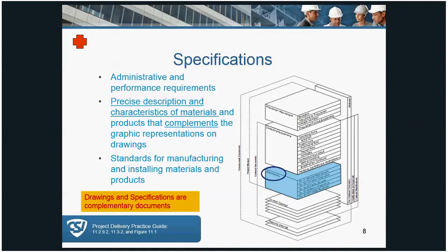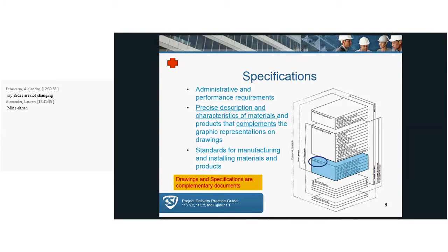Keep in mind that the most common error in specifying is what's considered over-specifying, where one method conflicts with another. An example of this is what's written below. You can call out for a Conair 451 storefront, a very proprietary requirement, fabricated from an ASTM B429 aluminum, and that product isn't necessarily made from that particular aluminum. It's probably made from a B6063. So you're asking Conair now to make a special run of aluminum to make the particular storefront.